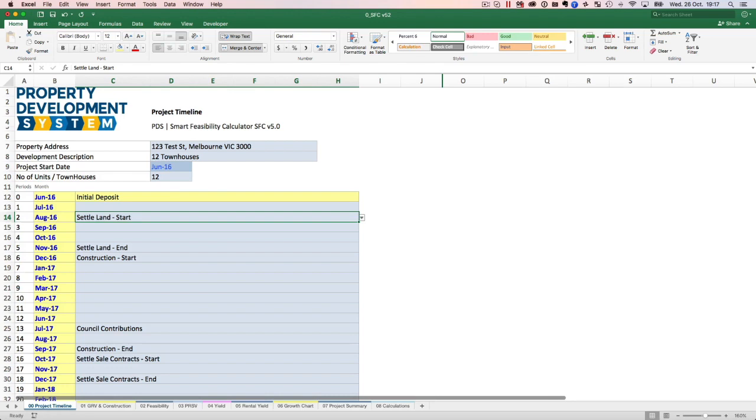So in our contract, I had clearly specified that we will only settle or give you the complete deposit when your notice of decision actually becomes a permit. So we waited another 21 days to put in the deposit, and if somebody had objected, or for whatever reason we had to pull out, or the notice of decision wouldn't have converted into a full permit, we had a choice to get out of the project.